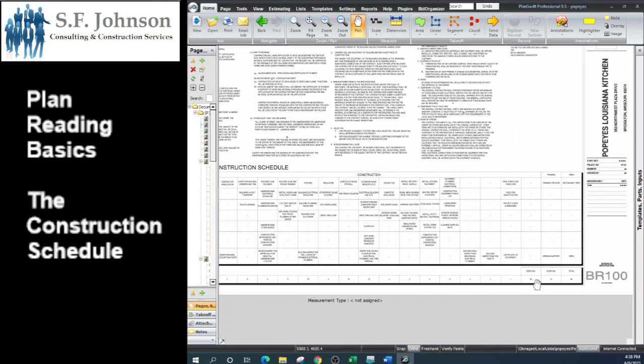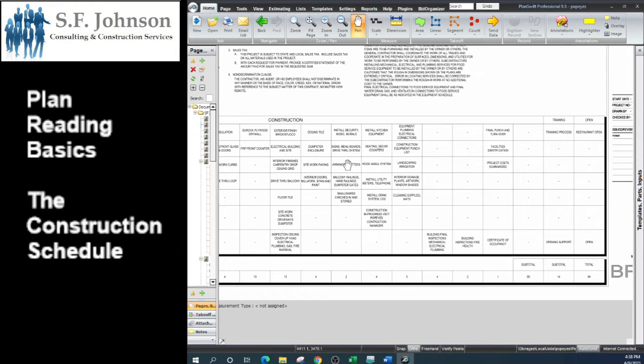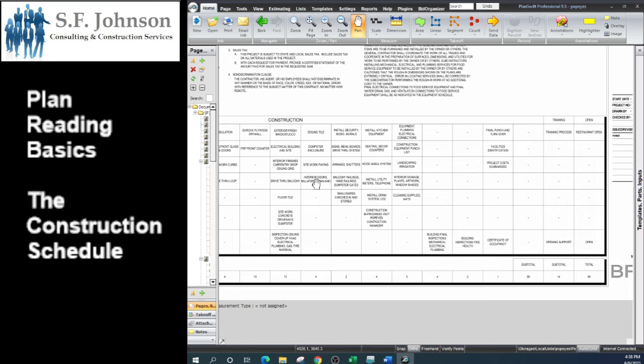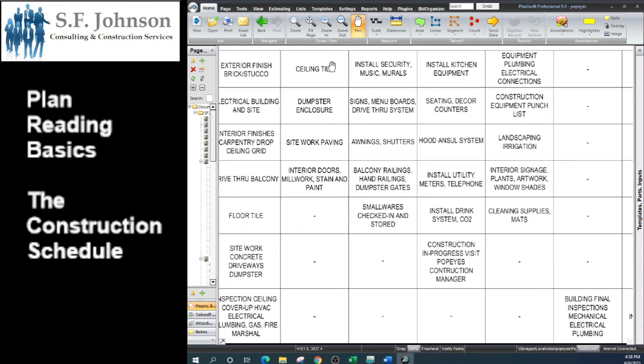Once we know how many man hours it takes to do whatever, then we can start to build the construction schedule. From a good estimate, you should be able to determine the man hours it's going to take for everything within that estimate. And some of the things you can do at the same time.